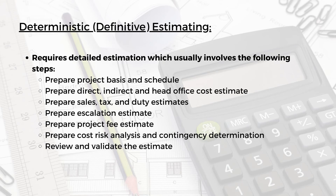For the deterministic or definitive estimate — class 1 or class 2 — detailed estimation is required, involving the following steps: preparing the project basis and schedule; preparing direct, indirect, and head office cost estimates; preparing sales tax and duty estimates; preparing escalation estimates, project fee estimates, and cost risk analysis with contingency determination; and finally reviewing and validating your estimates. Most videos on Cost Engineering Professional relate to deterministic estimation methodologies. Thank you for watching — if you enjoyed the video, like it, subscribe to the channel, and I'll see you in the next video.